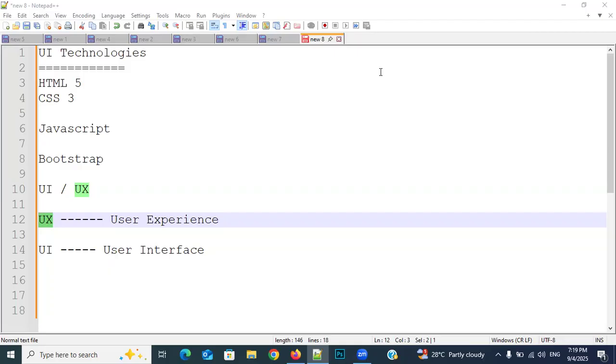The team leader and senior employees go through the requirements, and they will take one or two days. After two days, they will conduct a meeting. Who attends? The business analyst, the project manager, and the team leader of each and every team from each and every department, and they will finalize the deadline of the application. Understanding my point? Respond. What is the deadline of the application? In total, how many months, how many years, or how many days if it is small, how much time they require.